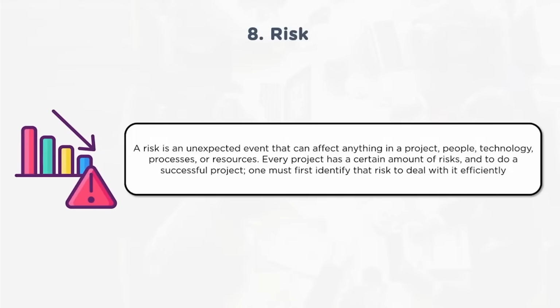Further, after creating a work breakdown structure, one will sequence the activities, based on the priority in which deliverables should happen and in what order. Once the sequencing is done, it is checked to see whether anything can be optimized so that there is a smooth flow of the project, with no dependencies that will make the project delay. For this, you find various techniques like critical path method, network diagramming, and critical chain method. All these are used.